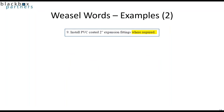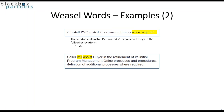More examples. 'Install PVC coating 2-inch expansion fittings where required.' The phrase 'where required' is broad enough to be interpreted a number of different ways. We could make it much more specific by simply saying where we want it required: 'The vendor shall install PVC coating 2-inch expansion fittings in the following locations,' and then list out the locations where you want the expansion fittings.